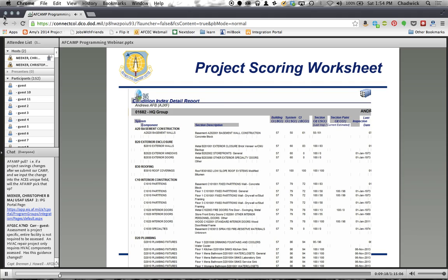The one rule that we have put in place is that you cannot use the entire building condition index. So do not use BCI. And this is for a couple of reasons. Number one, it's pretty general. You're not really telling us the condition of the assets that you're going to be working on. Number two, we've kind of seen some flaws in the way that Builder rolls up the subcomponents and the condition indices of the lower items to come up with this score. So bottom line, it's not that reliable. Don't use BCI.